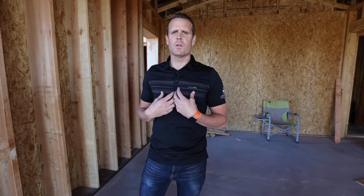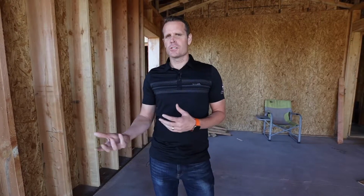What's really difficult in my circumstance is if I'm doing a small kitchen remodel, I have to speak to my framer who has a crew of 14 that are typically working together and say, hey, can you peel off 1 or 2 of those guys that come do this, right? So there's a lot of time wasted. We're waiting. Can this crew be available? Can they bring 2 guys? Maybe they're delayed. Maybe they had a flat tire, so now I gotta wait, and it ends up affecting everyone. And so the length of the remodel is much longer because I'm subcontracting.